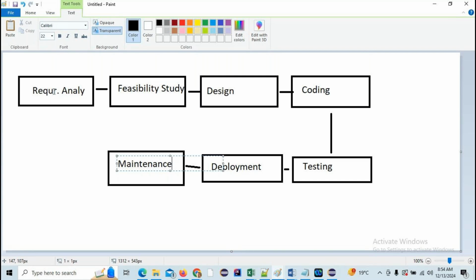Okay. Once the requirements are gathered, there is a meeting regarding the project with higher officials like architects, HR, developers and some project managers. These people sit together and discuss the feasibility of the project. So why did the architect come into the picture? The architect is the person who decides whether the particular technology available in our company is feasible for this project or not.